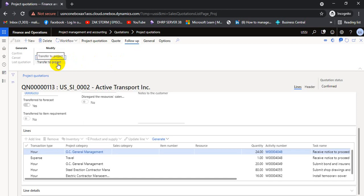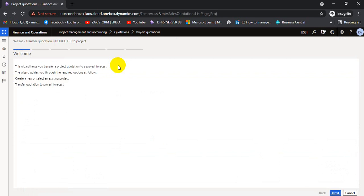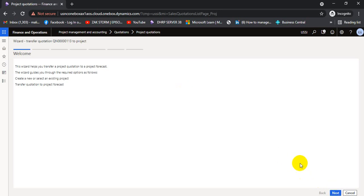We are going to transfer the quotation to the project. We go to the follow-up tab and select 'Transfer to Project.' The wizard has started — it will lead you through project creation and all WBS lines will be transferred to the project. We also have the option to transfer WBS lines to forecast, but in this case we will not move the WBS lines to forecast.